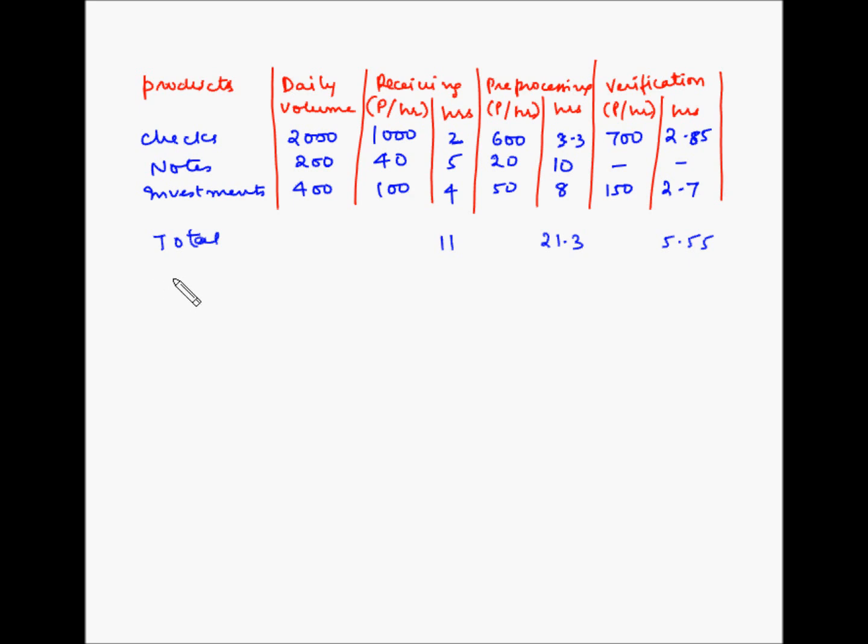So let's add a contingency of 25%. So basically we are adding 25% on top of these hours.